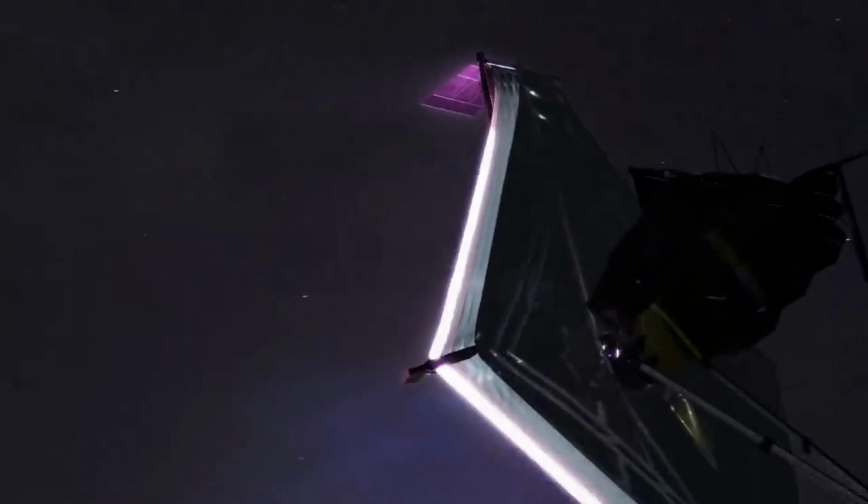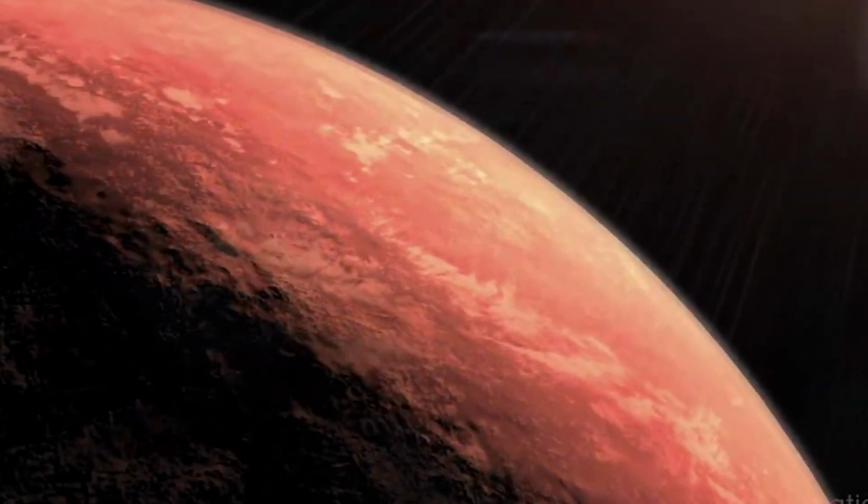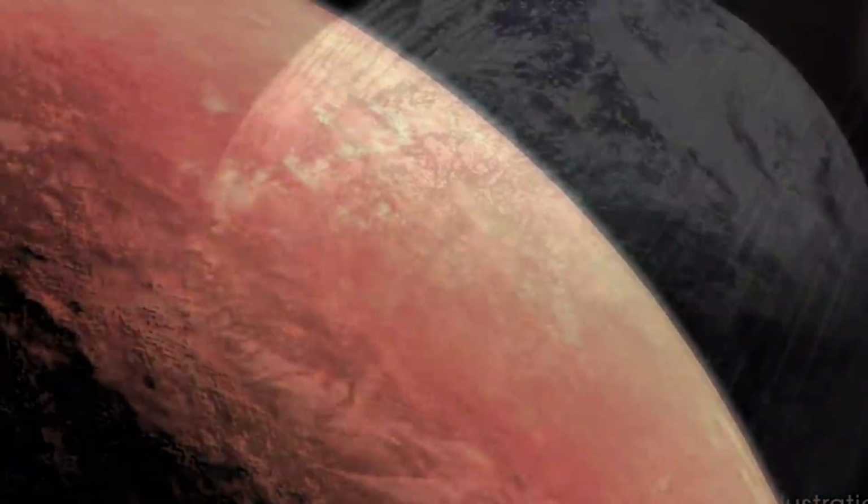Even though a Webb observing cycle is defined as a 12-month period, more than 1 year's worth of observations have been approved for Cycle 1. This oversubscription will enable a smooth transition between cycles, as well as provide a repository of flight-ready observations that can be moved earlier if a window opens up.